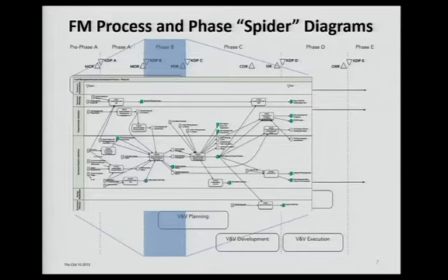at one point we went in and for each of these tasks, we put a percentage on it. So, for example, for this big task in the middle, maybe that had like a 35% on it. And what we meant by that is during Phase B, you're probably going to spend about 35% of your time, whatever that time is, whether you have a team of 10 or half an FTE, right? But you're probably going to spend the most time here. And that's the way we were trying to accommodate the different sizes of missions.